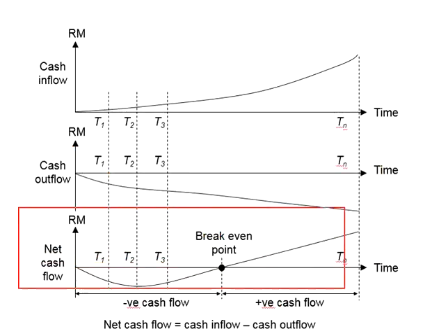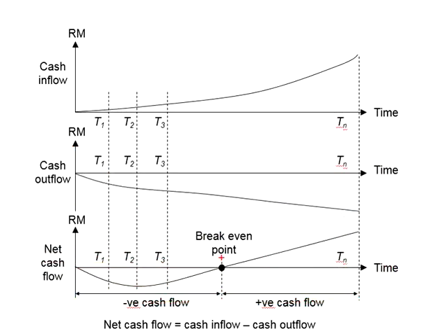And then from the net cash flow curve here, you will need to identify the minimum capital you need to prepare to ensure the project keeps going. And then at the end of the project, this shall indicate the profit that you are acquiring out of the development project. You can compute the return on investment by using the profit divided by the capital investment in order to see whether the project is worth investing in or not.